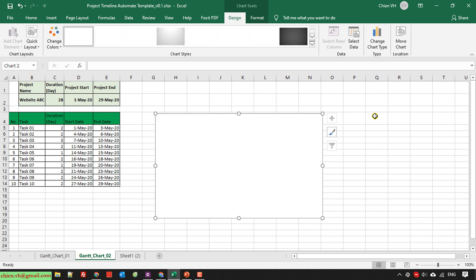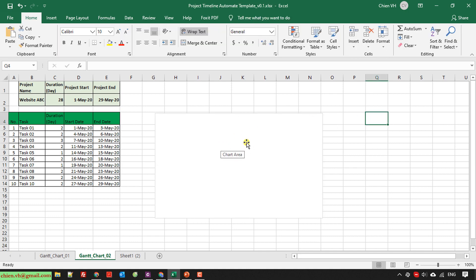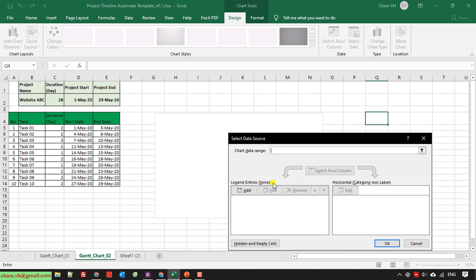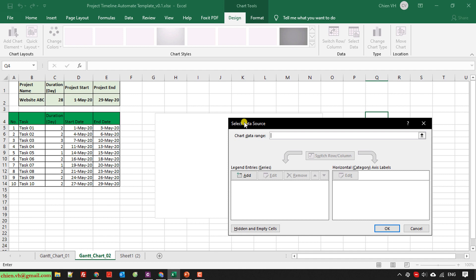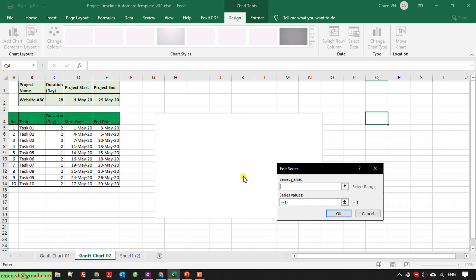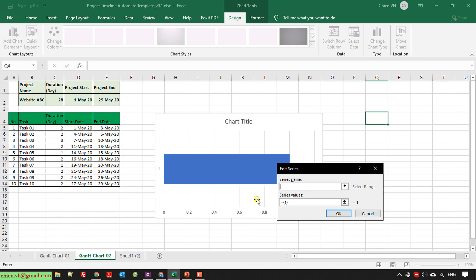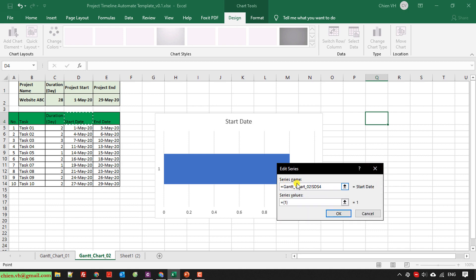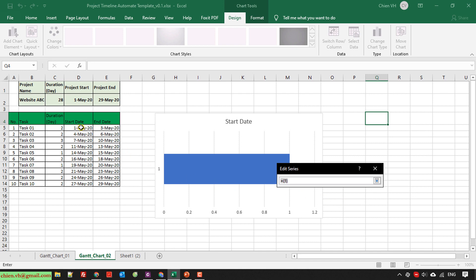Once the bar chart is added into my worksheet, I will right-click on it and select 'Select Data.' The 'Select Data Source' pop-up will be displayed. Look into the legend entry series and click the Add button. For the series name, I will add the start date — I select the start date column. Then I provide the series values, selecting the data for the start date from D5 to D14.